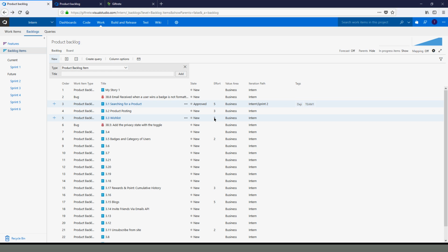And some people use the Fibonacci series, which is similar to what I've started to use right now. The smallest one is 1, the next one is 2, then 3, then 5, then 8. You're adding the previous two: 1 plus 1 is 2, 2 plus 1 is 3, 3 plus 2 is 5, 5 plus 3 is 8, then 8 plus 3 is 11. After 11, that is 11 plus 8, on and on like that. So that's what some people use.